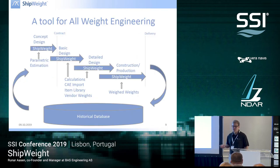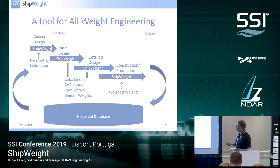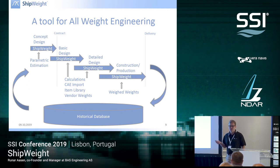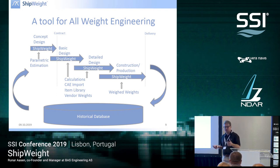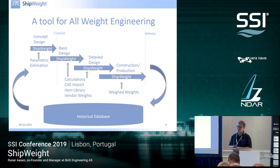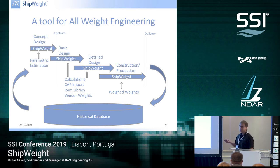You can start using ShipWeight in the concept design phase. In concept design, parametric estimation is key. In the very early phase, when you only have your main parameters for your project, parametric estimation is the best way. You need to have some historical data, but if you have that, there's nothing beating that method in the early phase.